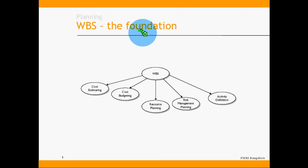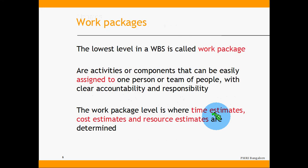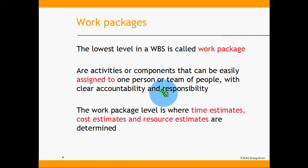Once the WBS is done, it becomes the foundation for all remaining work. Based on the WBS, you produce cost estimates, cost budgets, resource planning, risk management planning, and activity definition. The lowest level in a WBS is called a work package — activities or components that can be easily assigned to one person or a team with clear accountability and responsibility. The work package level is where time, cost, and resource estimates are determined. As a project manager, you exercise control at the work package level, not the activity level.